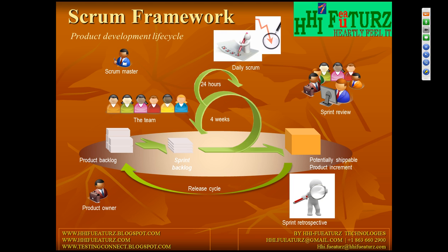As soon as the first user story gets ready, you provide a demo. When the second user story gets ready, you provide a demo. My point is, you can provide a demo as soon as you finish a specific user story, or plan 1 or 2 days at the end of the sprint, taking 2, 3 or 5 hours, depending on how much time it takes to demo all these user stories. The product owner demo is mandatory, but how you do it depends on the process you follow for that project.